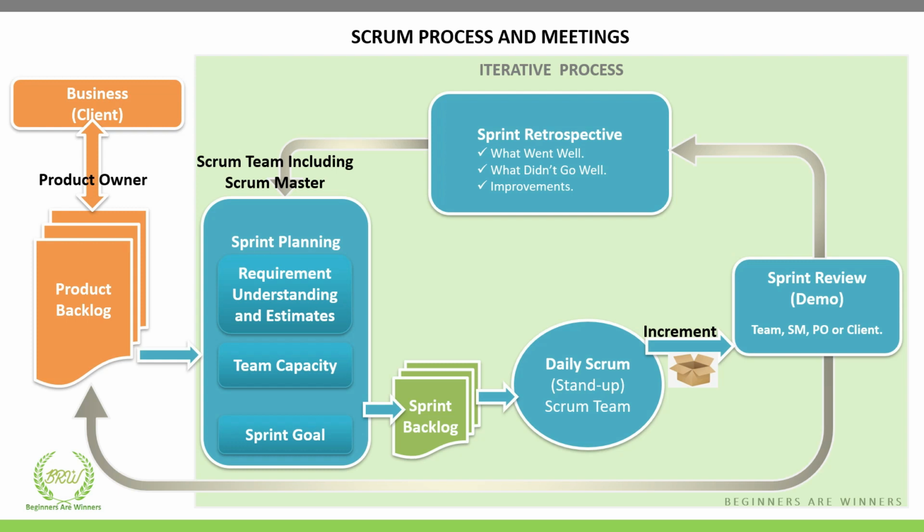Thereafter, the team self-assigns the tasks from the sprint backlog. It is usually in the form of epics, user stories, subtasks, or creation of test cases, mind maps, or bug fixes, etc. So once there is a sprint backlog and the sprint starts to work on user stories, features, or work items or tasks, that's how the team meets every day, maybe every early morning, for their daily scrum or daily stand-up meeting. It is a stand-up meeting because only 15 minutes are reserved for the meeting,